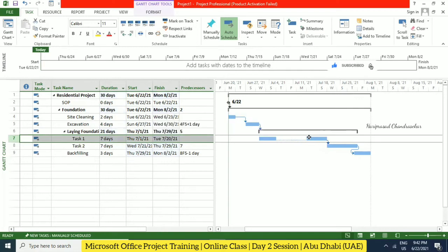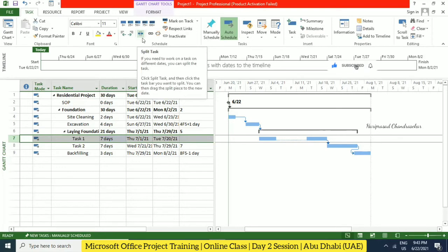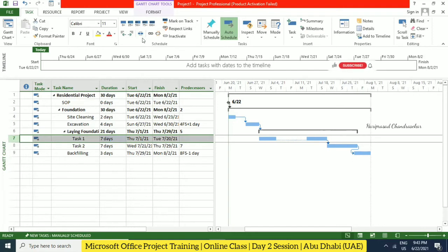Fantastic. So this is for one task, and if the one task is divided into two with separate times, you should use split task. Yes. The same task, but we are going to hold it for some time in between due to some circumstances, then we are going to release it back. Yes, this is something new to me. Yeah, good. Too many new things are being done here, but most of the stuff from yesterday and today, now I'm learning. Okay.